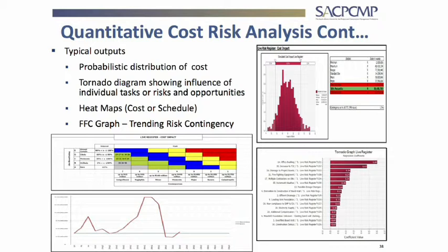On a heat map you can have two versions: schedule or cost. It shows the likelihood of the risk happening and the consequence — either in monetary value or schedule. The red ones indicate high likelihood and significant impact. For example, a maximum 10 million monetary impact or a 12-week schedule overrun. Everything runs off the simulation and they all tie up.